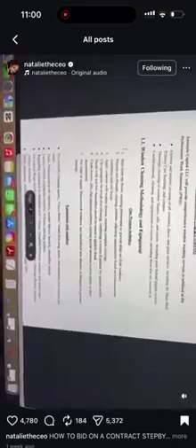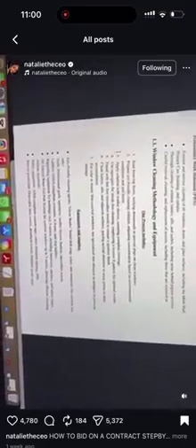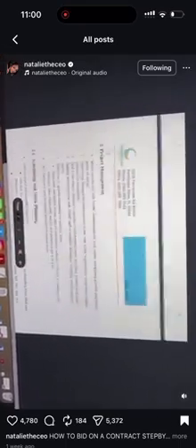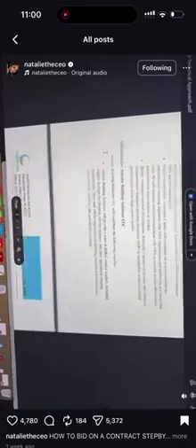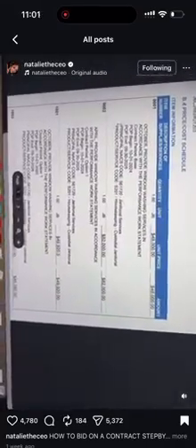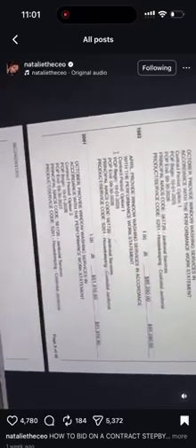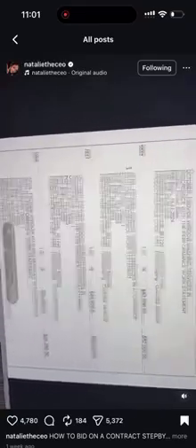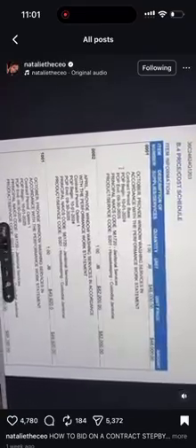See? And then this is the technical approach, which I had ChatGPT create for me with the information that my subcontractors gave me and all the information that the solicitation required. And then this is my pricing. I just filled it into the pricing sheet that they gave me, and that was it. I grabbed my cheapest subcontractor, I put my quote on top, making sure I was just under my most expensive subcontractor, and that's how I was able to determine my pricing, and I submitted.